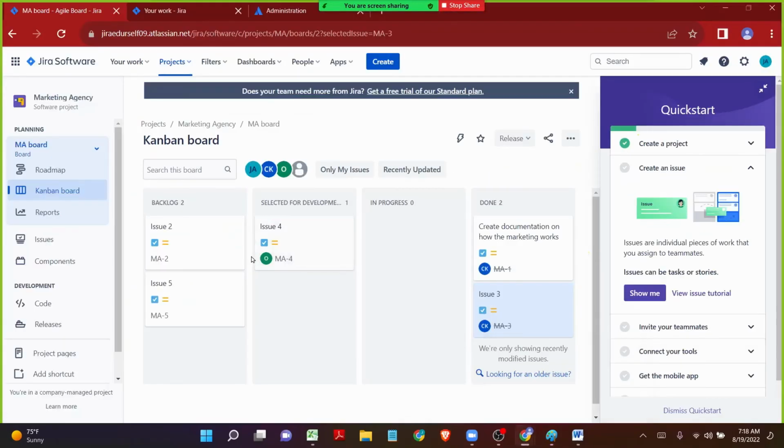As soon as one work has been completed by the user, the other work will be given to that user. So the workflow is continuous. There will be no time span like 1 week, 2 weeks, or 3 weeks. However many years you work in the Kanban, your workflow will be completely continuous. If you take 1 week to complete one work, the very next day you will get the next work. If you spend 20 minutes to complete one work, the very next moment you will get the other work. So the workflow in the Kanban is continuous.